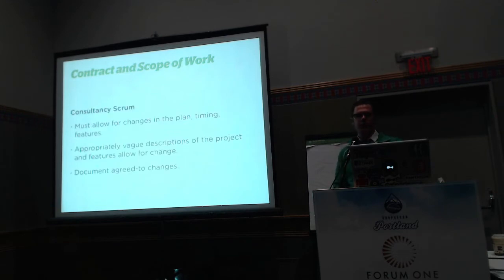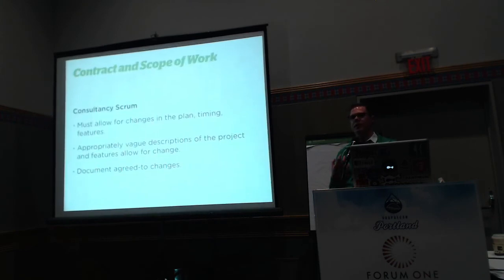But when you're a consultant, the contract is everything. If something goes wrong, the first thing that gets pulled out of the drawer is a contract. But you said here you were going to do this. Yeah, but we're Scrum, right? Things change. So you have to make sure that your contract and your scope of work allow for changes in the plan and the timing of features.